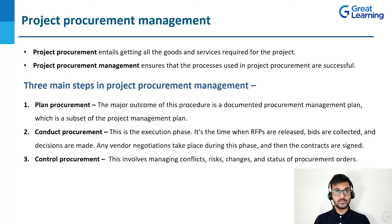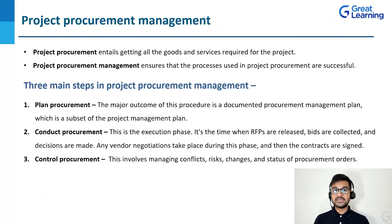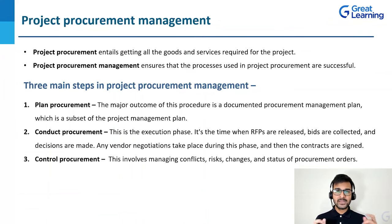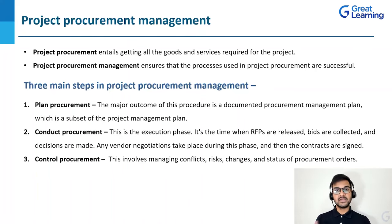The last phase is control procurement. Once everything is executed, control procurement involves managing conflicts, risks, changes, and status of procurement orders. Delivery should be on time, quality should be correct, and quantity should be correct. This is the inspection part — ensuring all quality and quantity standards are followed, and all specifications set in the terms and conditions are met. Project procurement management is a subset of the entire project management — sometimes handled by a procurement manager, sometimes by the project manager, depending on the project size.